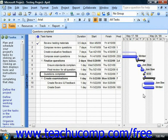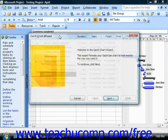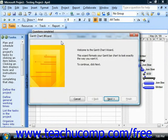To use the wizard, first open your project file and switch to the Gantt chart view of the project. Next, choose Format from the menu bar and then click the Gantt chart wizard command in order to start the Gantt chart wizard.